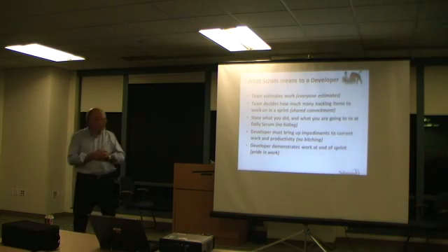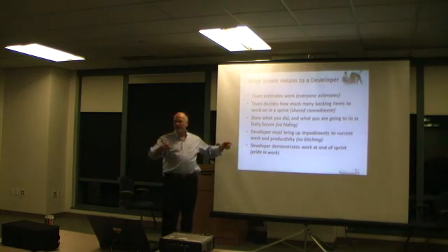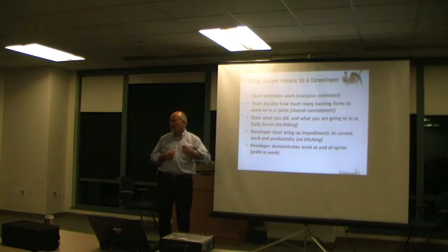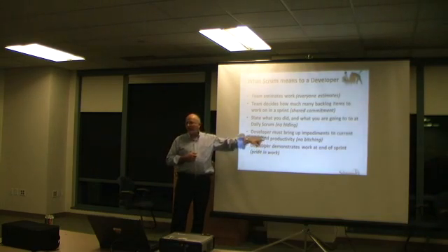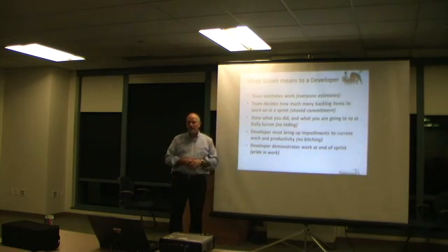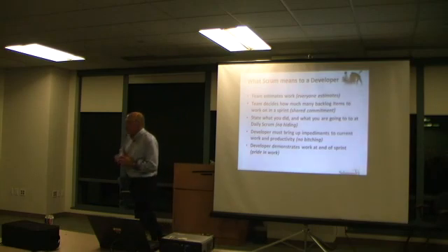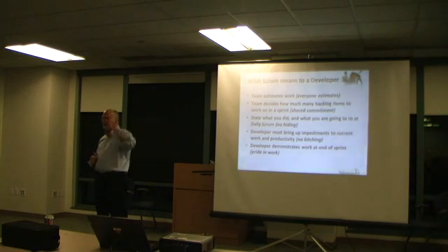That's a good one. Along the way, the thing I have a hard time with teams that have been meeting for a long time is they stop bringing up impediments. They stop bringing up how can I be better, faster, smarter, stronger, better looking. So don't complain, but come up with some ideas that say, you know, if you would just get me 2 screens instead of 1, I'd be more productive. If you would just tear down these cube walls, that'd be better. If you would let me go to No Fluff, if you would pay for me to park to go to SeaJUG tonight, I'll be smarter. That's an impediment that a Scrum Master can do something with.